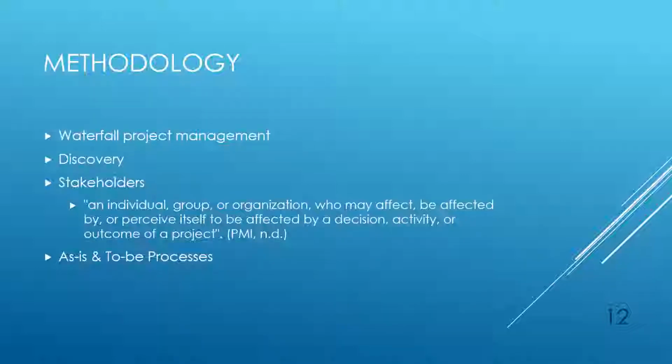A little bit about our methodology. From the project management point of view, the project methodology was tried and true waterfall, with each successive step coming to a gate review before the subsequent step began. The initial phase was discovery, where the foundation and basic knowledge of the system was investigated and documented. Discovery is also known as the analysis phase in a waterfall project. It is a key phase as it sets up the possibility of success in subsequent phases. A missed requirement from a key stakeholder in this phase can be disastrous down the road. It is key to involve all stakeholders and to gather the requirement from each of them prior to proceeding.